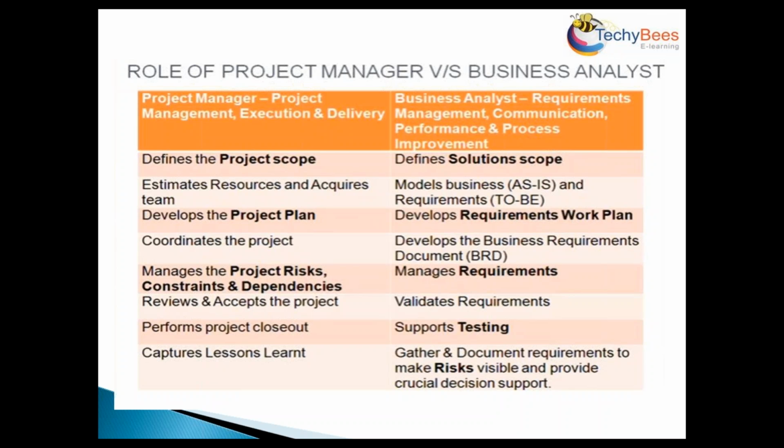Or there are some stakeholders who would say, please take it on your shoulders, spend money from your pocket, finish the system development, then we will go ahead and release the money for you. Initially, we will not release the money. We will give it to you in part payment, 15%, then 25%, 15 plus 10.